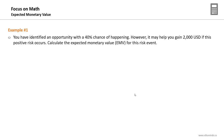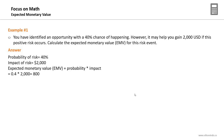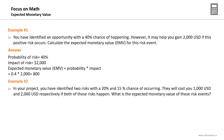A simple example: you have identified an opportunity with a 40% chance of happening that may help you gain $2,000 USD. Calculate the expected monetary value — simply multiply probability by impact: 40% × $2,000 = $800 USD. An important point: you need to give a positive sign for opportunities and a negative sign for threats in the EMV formula.